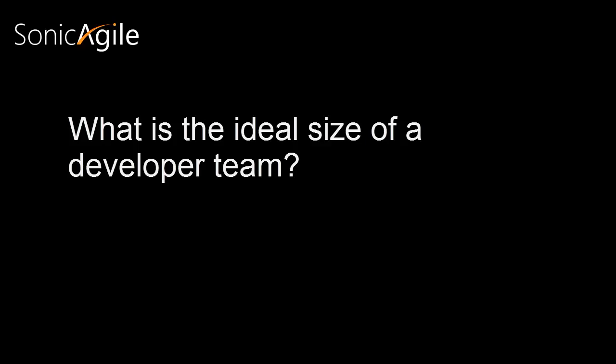So I mentioned that if you have a very large project and you're working with a lot of developers, you would start using something called Scrum of Scrums. So say more about what that is. What is a Scrum of Scrums? Well, let's say that you have a lot of people working and you've divided up the work. You might divide up the work in some logical sort of way. You can have different Scrum teams working on different components, for example. Well, then the developers on those Scrum teams, they meet, they do their work, they have their daily Scrum, and then you can choose a delegate from each of those Scrum teams to attend a second meeting. It's usually held after the first daily Scrum. This would be the Scrum of Scrums meeting, I'm sorry. And each team then would report out to the other teams, and all the teams would coordinate their work.